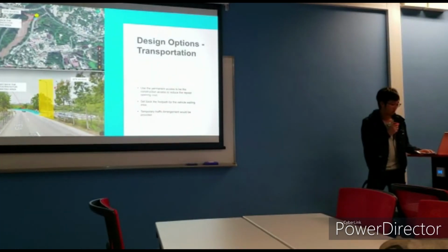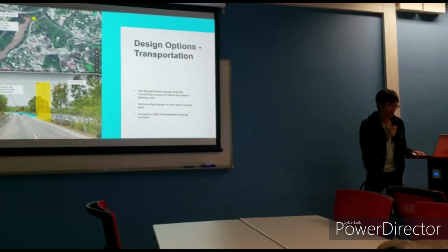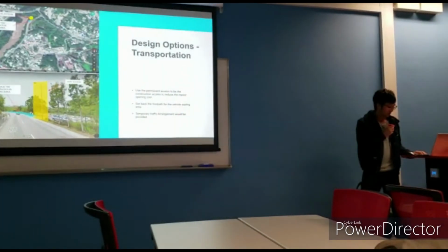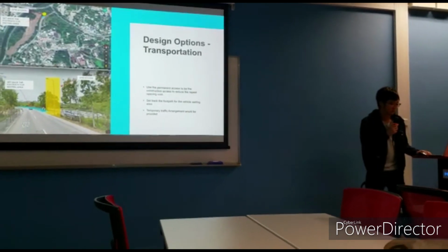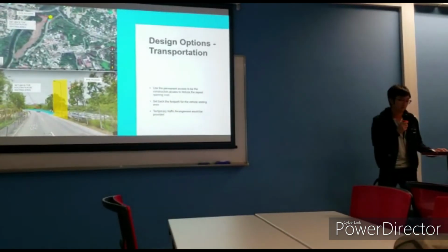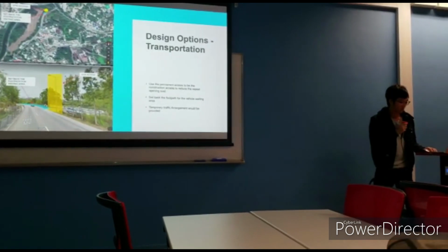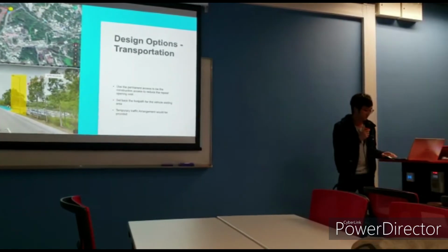Firstly, the temporary traffic arrangement would be provided for the temporary diversion of pedestrians and the site access. All setting up will be according to the code of practice for the lighting, signing, and guarding of roadworks, and accepted by the transport department and road management officer.